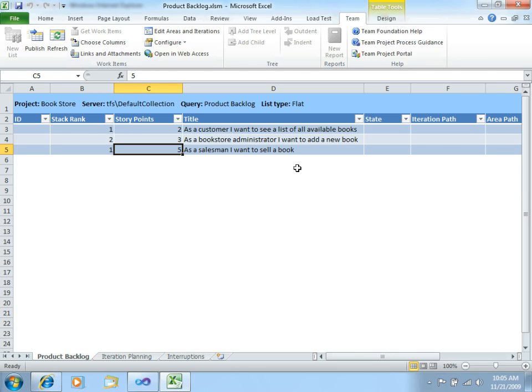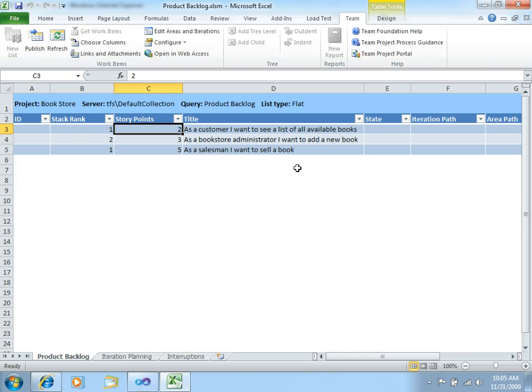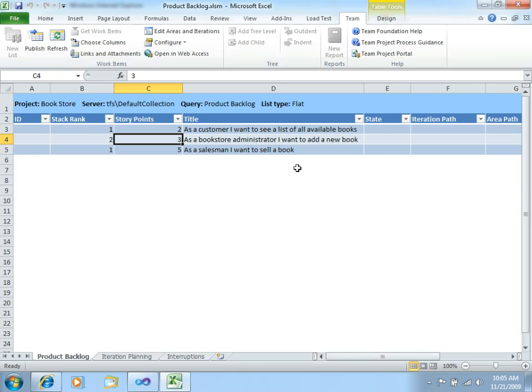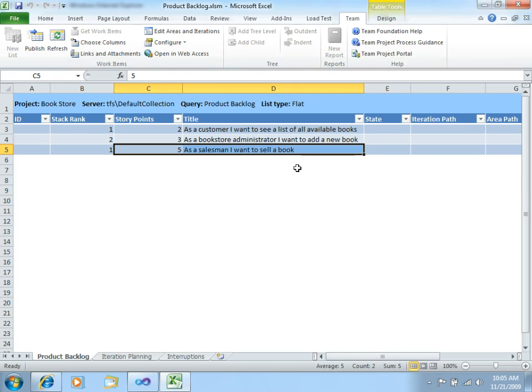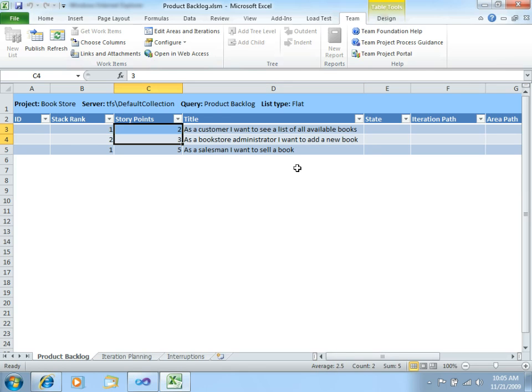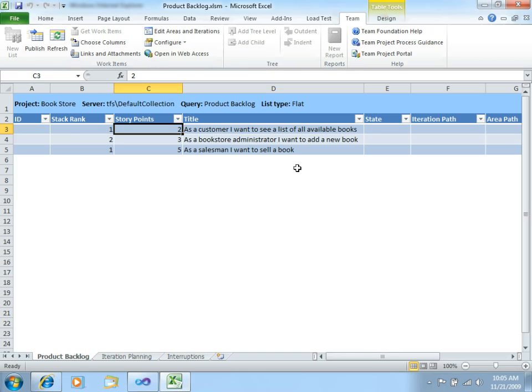So, if this was like a big project, you might say, okay, I have time for five story points in each sprint. So, you might say, okay, let's develop these two ones first, and then this one in the next sprint. Five story points and five here, or any other way.